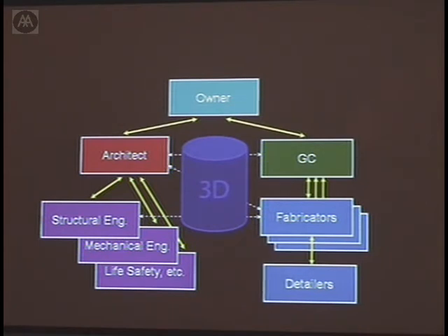You actually have to look at what it means to contractually record information to the point where you can use the three-dimensional model as the primary instrument of contract, not the drawings, not the bill of quantities, not the QS. The 3D model becomes the driver for everything. And I'm happy to say in this country there's a committee called the Construction Fabrication something, which is a joint venture between RIBA, the RICS, the QSs, the Institute of Civil Engineers. All these guys got together and said, we have to find a set of standards where this can actually occur. So this is beginning to happen in the UK.